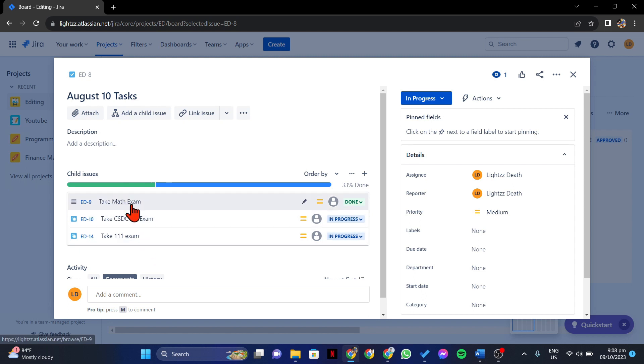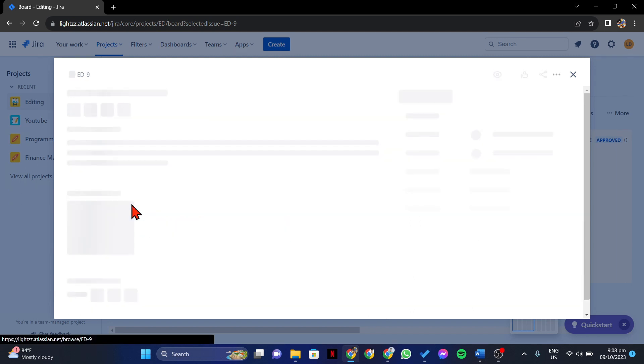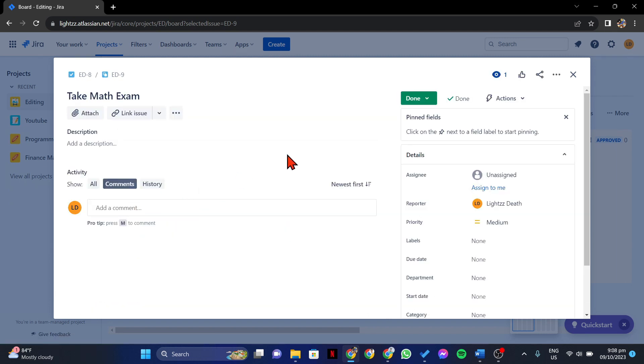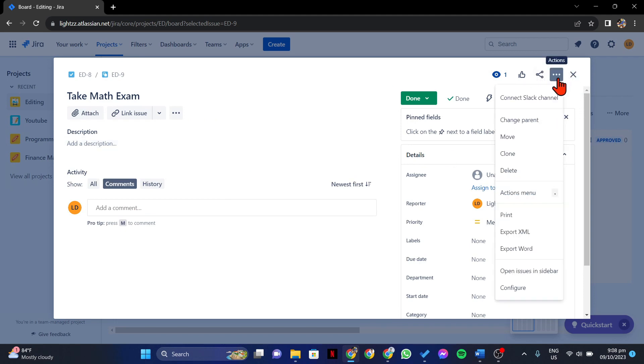Find the subtask that you want to delete and click on its name to open its details. Now, to delete this subtask, click on the three-dot icon at the top right and in this menu, select the Delete option.